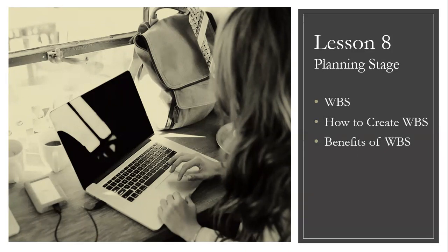And the first one, the project scope statement, just to give you a brief again: we capture the requirements of the scope mainly from the project charter, where certain components of the project are captured at a high level. We also do one-on-one interviews and meetings with the stakeholders and capture the project requirements from them. And third, we go through company historical data, if there was a similar kind of project in the past, and from there we also pick up some requirements. That's the project scope statement.